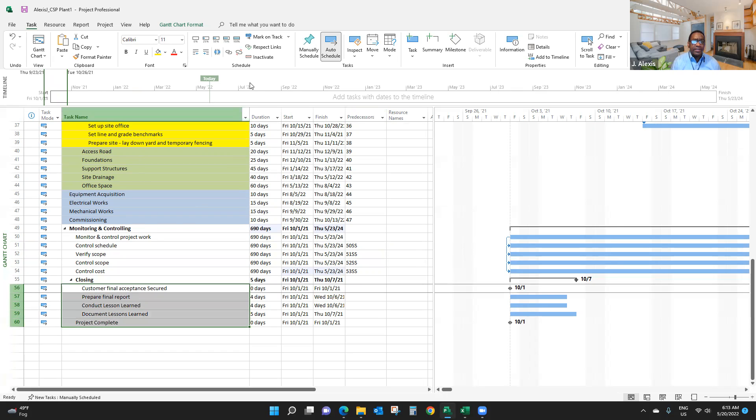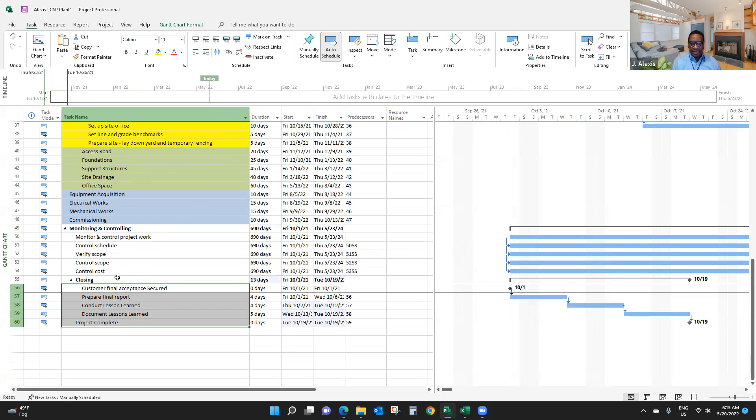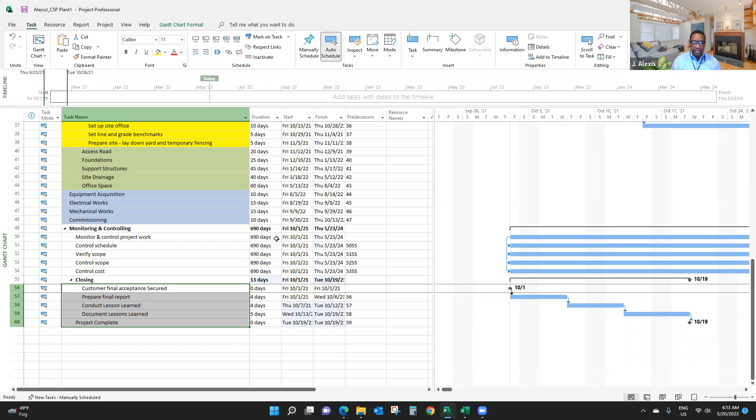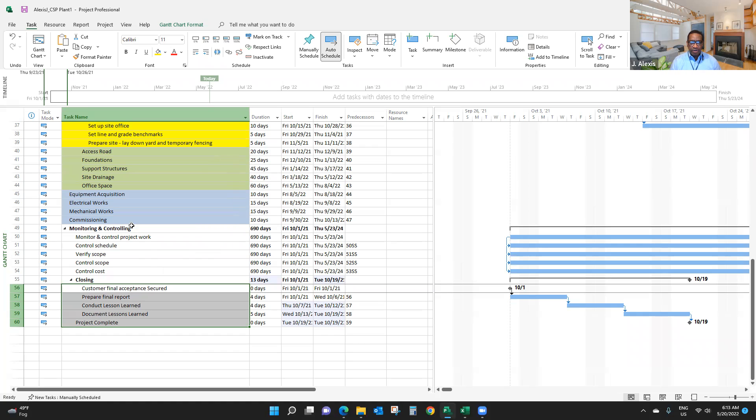Let me link the closing activities. Now, you don't have a closed network diagram yet. For a network diagram to make sense, all items must be connected, must be part of the network, unless you have a good reason to leave something out. Every item must have a predecessor, obviously except the summary item. If not, you link the sub-item.